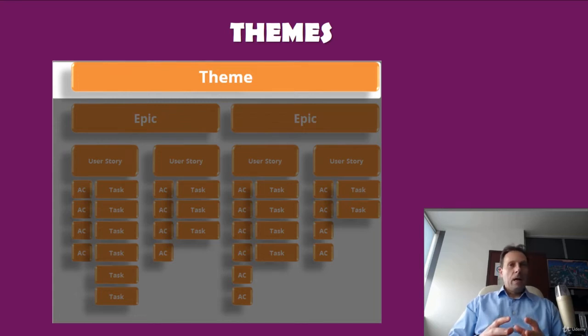Themes. Products are typically described by hundreds of requirements which are organized in the product backlog. Themes or epics cannot be completed in one sprint, so they are broken into small user stories and subsequently a group of related tasks. Epics are then delivered in releases, but even small user stories from different epics can have something in common. Such a group of user stories is called a theme.